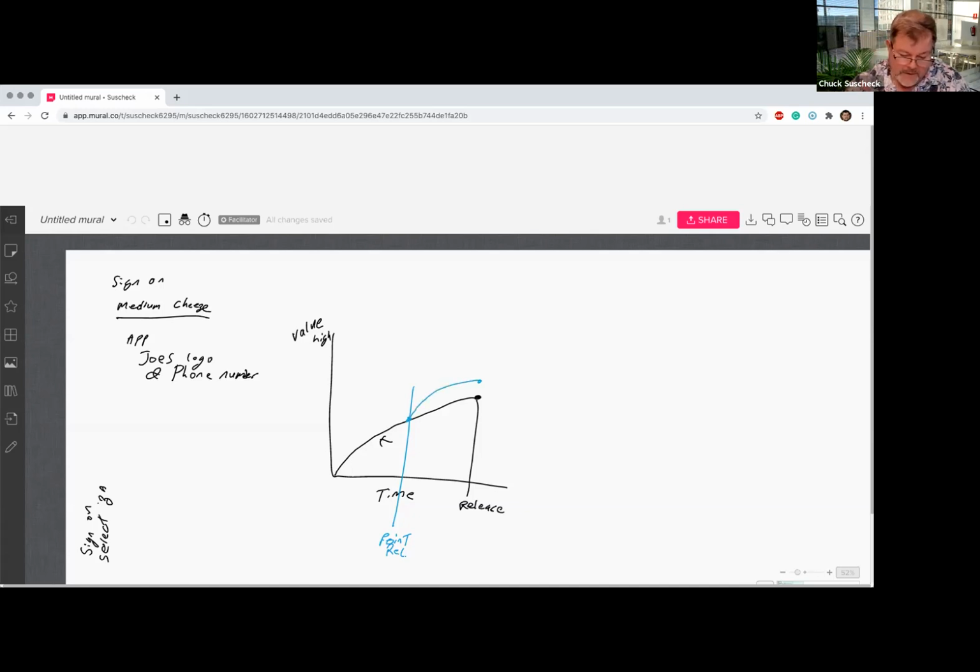Maybe we should amp up the things that they're using and minimize the things that they're not and shoot toward another piece of value, which we can then have another point release, and maybe even shoot toward a higher level of value. How's the customer going to use the product? How they're going to use it is a real risk. And by having multiple releases like this, you can start to get an idea on how they're using it and mitigate that kind of a problem.